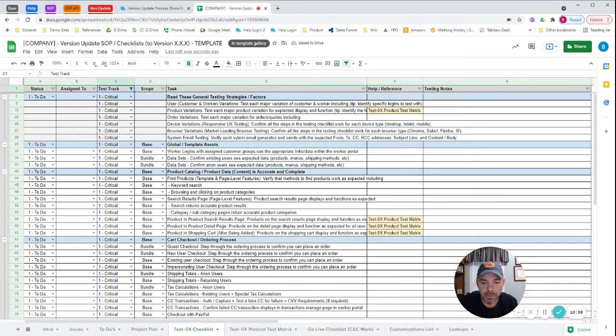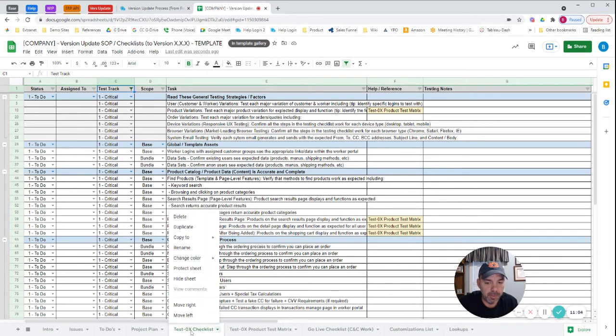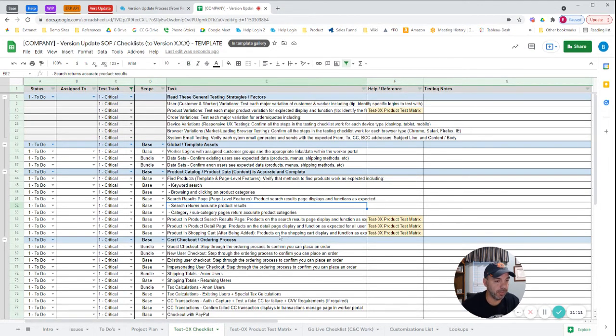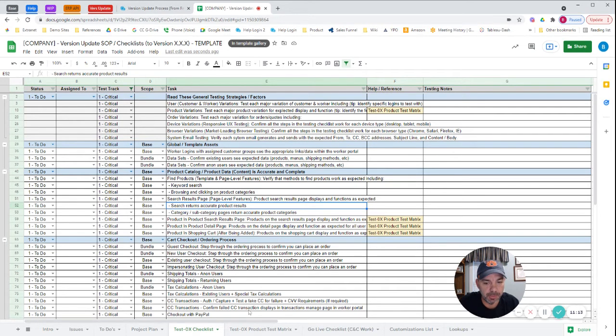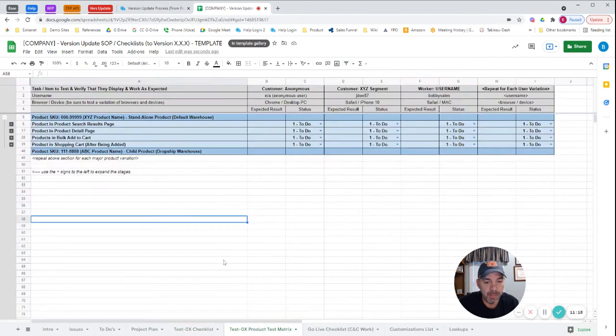A notable that you can do in this is because you're going to use this test checklist more than once, I would number it, and you can actually right-click and duplicate this sheet. When you duplicate it, you could have a test 02, test 03, as you're going through the different stages or doing more dry runs. At the very least, you're going to do one in stage 1, and you're going to do one again in stage 3.